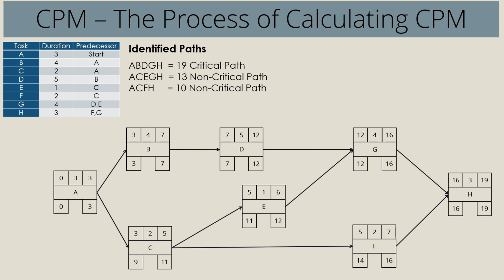So in this lecture, you already know how to draw the PDM network diagram for this. Let's calculate the total float of each activity. We'll write that above each node. If you recall from the previous lectures, we can find the total float by subtracting the early finish from late finish, or early start from the late start. For all the activities falling on the critical path, the value of total float will be 0, as we have already maintained in our previous lecture. But you're free to calculate it, and you will find the total float values of all the activities on the critical path to be 0.